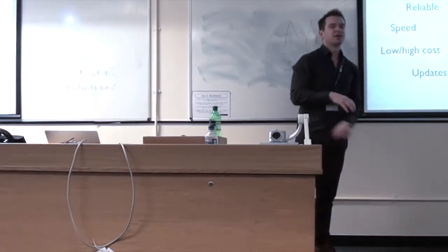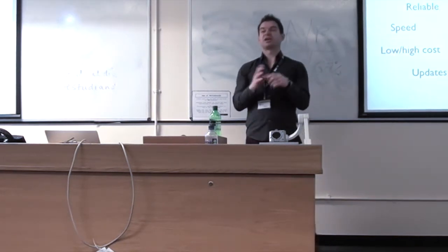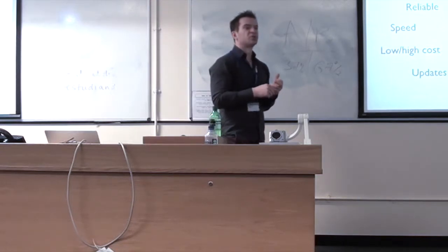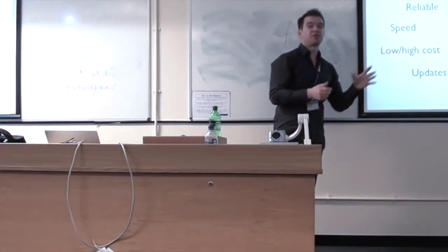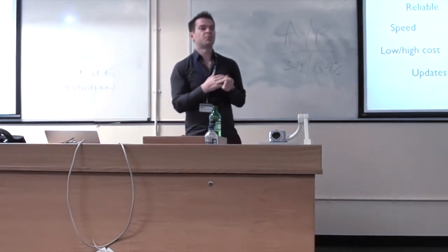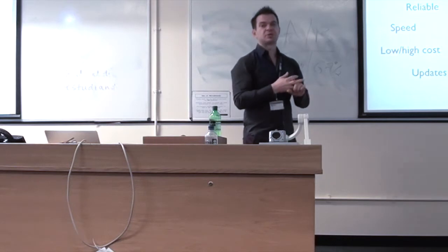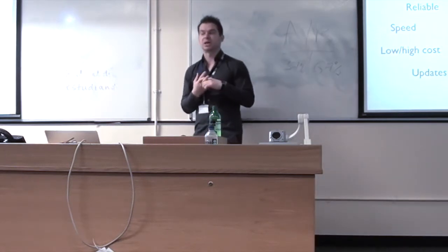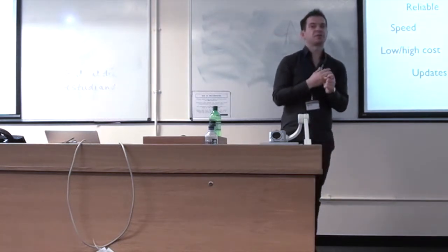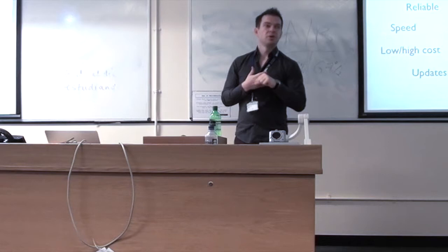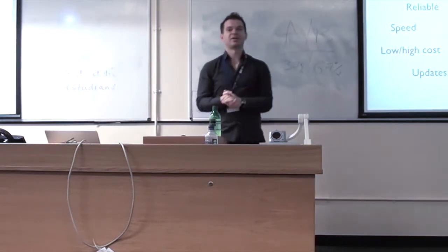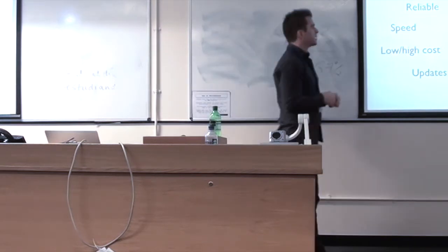Of course, support is really hard to find from the ones that are going to support you all the time if you had things to change. Because as soon as they get the work done, they'll be like, okay, I'll finish the work, please pay me as soon as possible. You normally pay 20% in the beginning, 40% midway through, and then 40% when the work gets done. So all they want in their world is the money and a good review on their platform, on their profiles. As soon as they get that, bye-bye, they will just go. Okay?